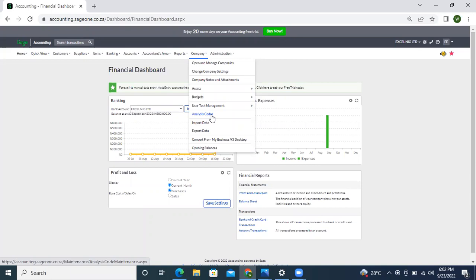And as you enter materials or services used in the course of running that project, let's say you're entering them through your accounts payable, they can optionally be assigned to those projects, to those locations, because definitely you're going to be setting up the location. We cannot talk about a project without looking into location. There must be a location, there must be a department involved as far as a project is concerned. And it's definitely going to be assigned to those aspects. So you can compare your actual cost with your job estimate. And that's more reason why it's very important.